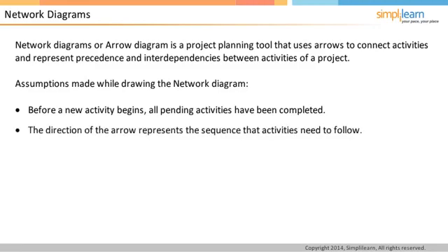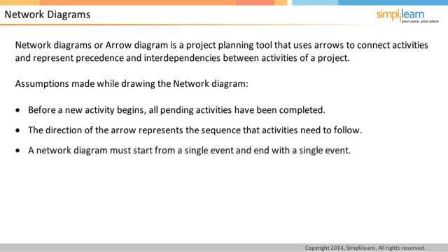The last assumption is that a network diagram must start from a single event and end with a single event. There cannot be multiple start and end points to the network diagram. In the next screen, let us discuss some terms related to network diagram.